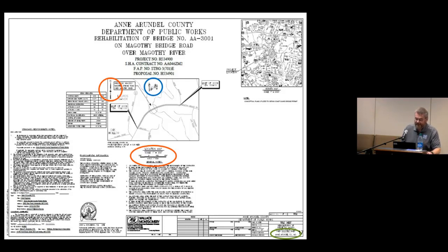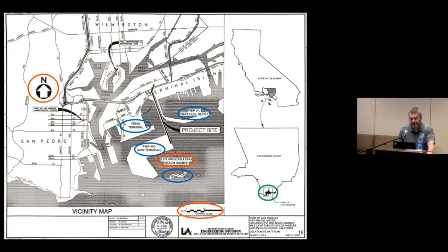We'd likely reach back to the applicant to ensure that this is not an oversight, since we'll likely be speaking to the applicant about other necessary changes. Lastly, hunting around this plan sheet, you figure out this is actually in the state of Maryland if you look down to the title block on the bottom right in green, but there's no small map of the state on this plan sheet, which makes it difficult to determine this at a quick glance. With all that said, there are too many unnecessary notes on the plan sheet. If all the excess verbiage was eliminated, the location map could be enlarged for easier viewing. All right, now this is a much better example of what we're looking for.